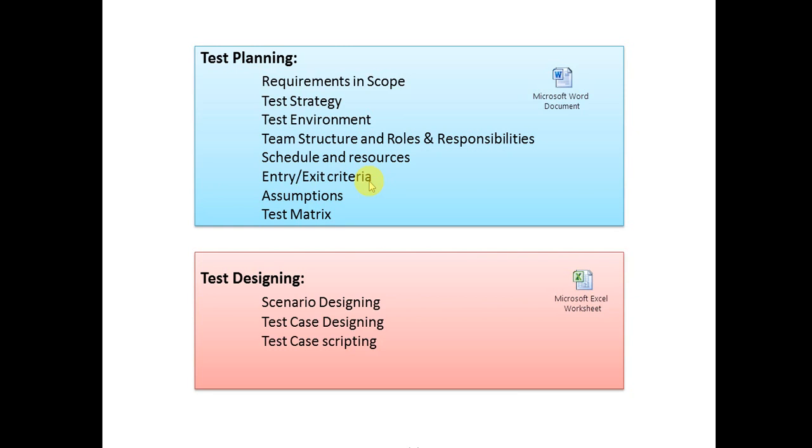Assumptions cover requirements that haven't been implemented and won't be tested in this release but can be moved to the next release. Test matrix identifies how many test cases one resource needs to execute per day or per hour based on priority and complexity.